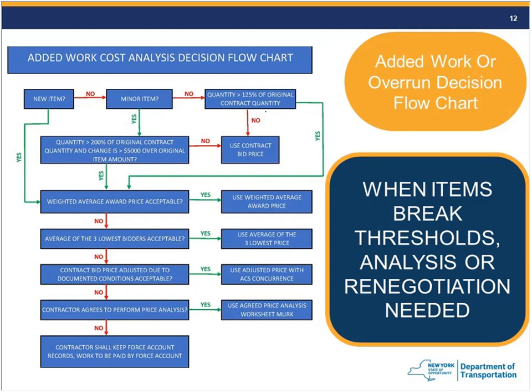Yeah, okay, so you're working on your cleanup order. You still have a balance of unused FCP money. In your cleanup order, you would negate the remaining balance to bring that to zero. Yeah, I think that kind of sums it up.